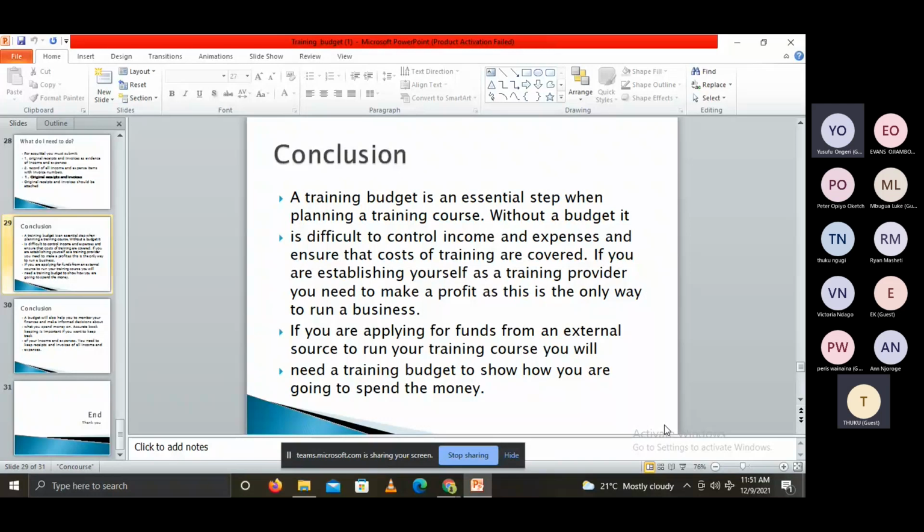Then you say, who sells this photocopy machine? We have this company. Which are the best? Already you have been given the best by the user department. Then you just ask that company, can you send us a pro forma invoice for this kind of photocopy machine? So when you are putting it as an item in the budget, the price is much closer to what you will require. That is very, very important, so that you have accurate figures.